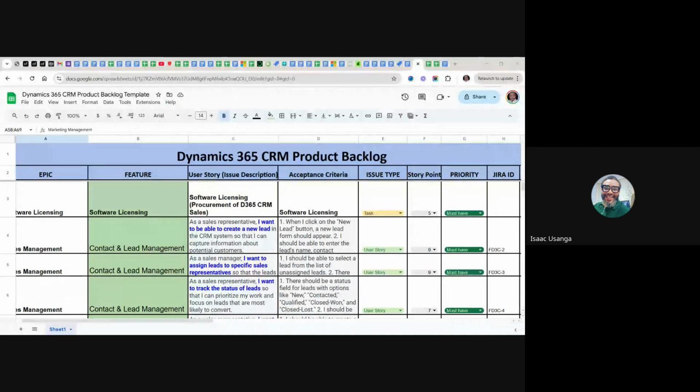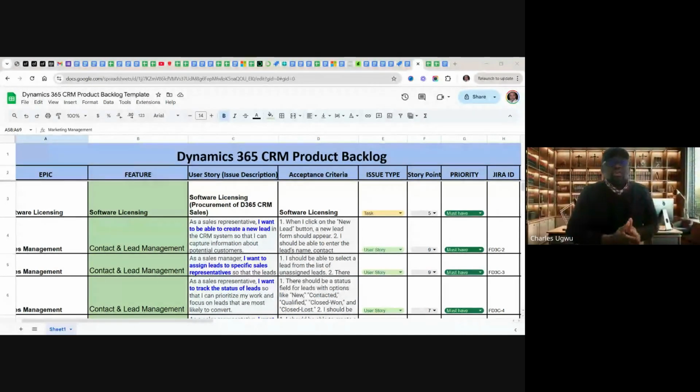You can plan for it in an upcoming sprint, because the sprint is just a 2 weeks interval. Another sprint will start. It's only if you don't need all the work items in the whole sprint that you can stop the sprint and then plan for the new work item. But if you still need value in the current sprint, there is no need of adding items there or stopping it. All you need to do is wait, and then in the next upcoming sprint, whatever you want becomes the highest priority.